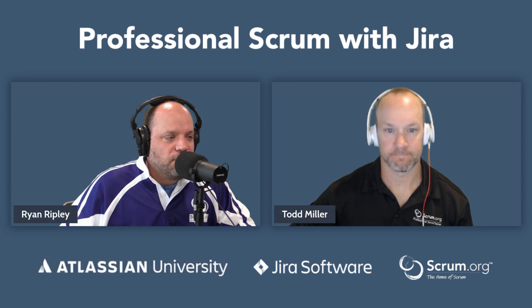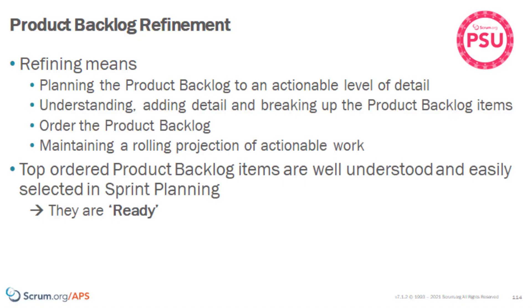Today we have a fascinating topic: product backlog refinement. I want to make sure we define this before we get too deep. Refinement — what it actually means from a professional scrum stance — is we're going to plan the product backlog to an actionable level of detail. We're trying to add understanding and transparency to the product backlog. So we're going to add detail, break up product backlog items, and order the product backlog by some form of value. It's also maintaining a rolling projection of actionable work.